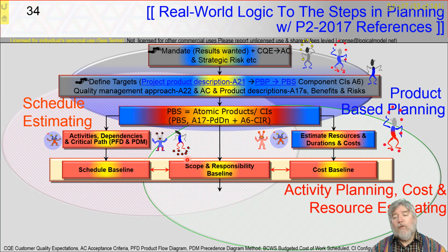we have a view of what's scheduled to be done over what time frame by what people at what cost, and that establishes for us either our burn down chart or our earned value. Now it's a bit of a cheat really, I've put it at the bottom here, but all the way through we should have been thinking about risk. We started with strategic risk, which was risk to the investor by selecting this project, but we also have tactical risk, which is risk related to the performance baseline about, well, what could go wrong in terms of accelerating or screwing up our expected expenditure or expected timescales.